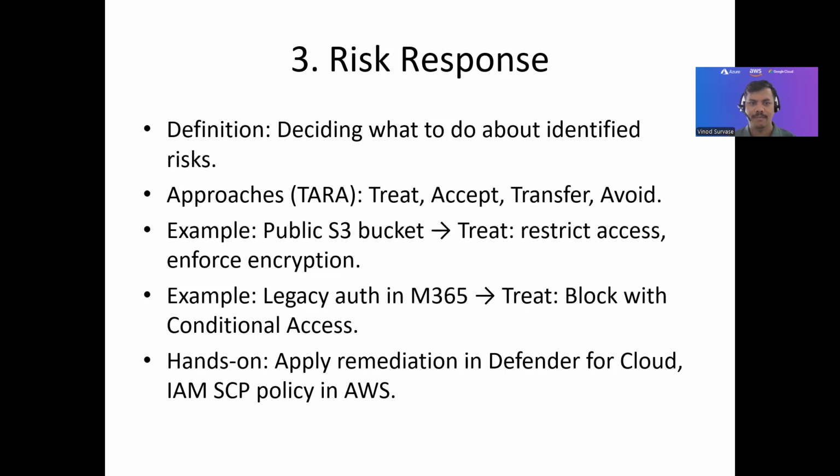So these are the different approaches. Treat means you are going to take actions. Accept would be if we are ready to accept the risk. Transfer means transferring that risk to different teams or different owners. And if we say avoid, that means we are not taking or accepting the risk as well as not treating it as a risk.